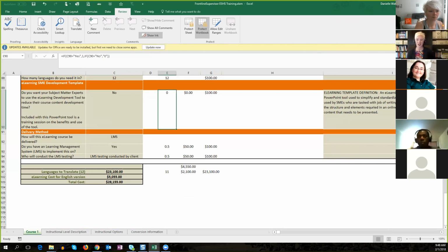The syncing doesn't change that much, a little bit depending on the language. So we charged more for the English version to do the work, and then the rest of them were about $2,000 a piece. They were really inexpensive because it didn't take us much. And then you'll notice there's no audio in here.